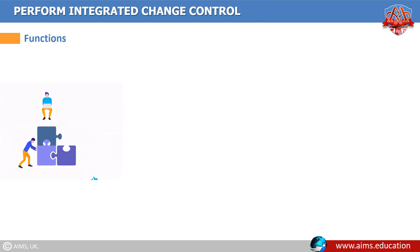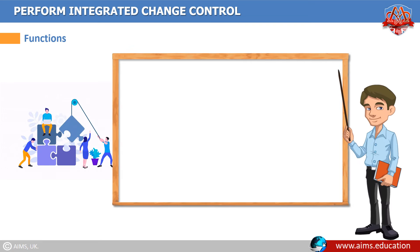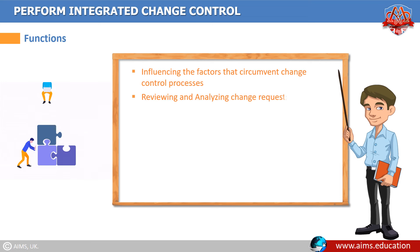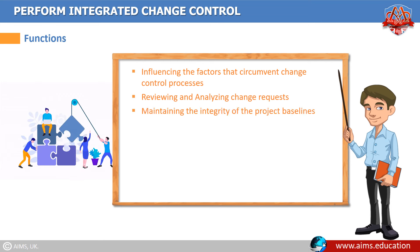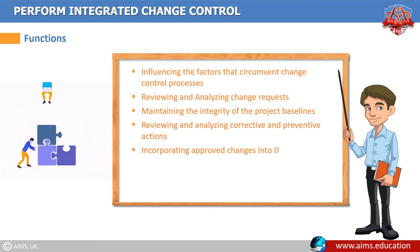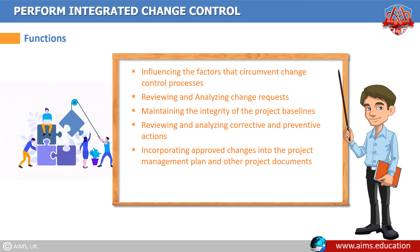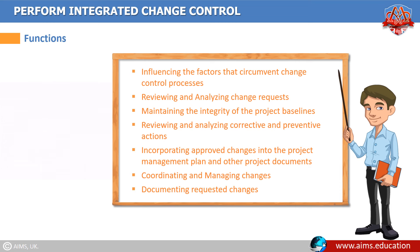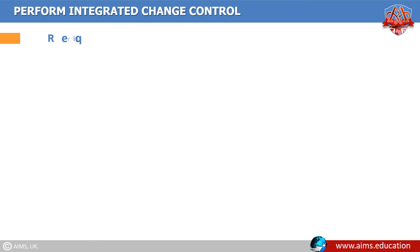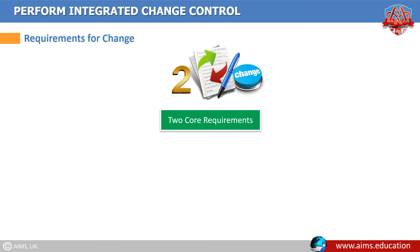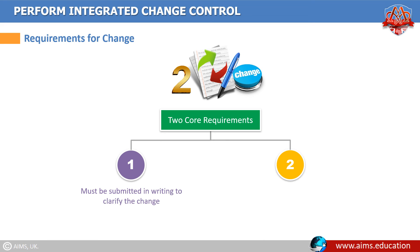Functions of the perform integrated change control process: influence factors that circumvent change control processes; review and analyze change requests; maintain the integrity of the project baselines; promptly review and analyze corrective and preventive actions; incorporate approved changes into the project management plan and other project documents; coordinate and manage changes across the project; and document requested changes and their impacts. Requirements for change: all change requests must be submitted in writing to clarify the change, and all change requests must come through the formal change control system. No one can directly ask the project team to make changes.